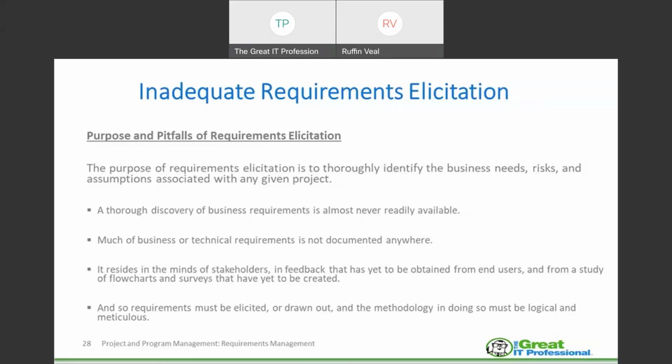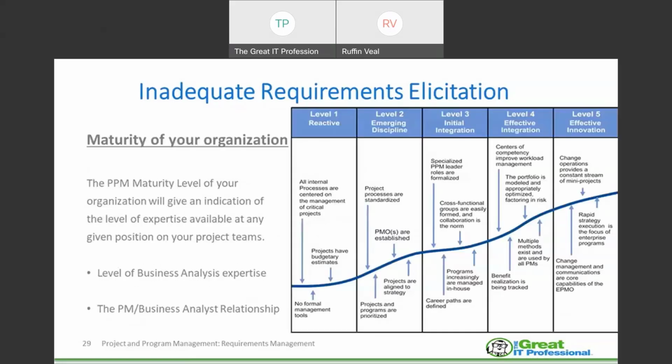So you've got to be able to go out among the user personnel, among the stakeholders, and gather this particular information, okay? You're going to have some documentation, but be forewarned, don't rely simply on documentation that's written down any place at any point in time, simply because documentation tends never to be upgraded, never to be updated, okay? It's always behind what is actually out there or what's actually being used, okay? So let's talk about those other elements of inadequate requirements.